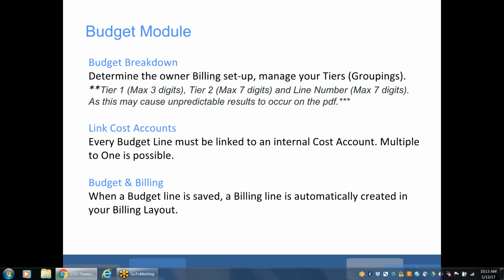So a cost accountant goes in and imports a default of cost accounts, but in order for them to complete the portion, they have to actually create a budget line to link it. So they'll usually create 01 general accounts and then link it to that budget line.